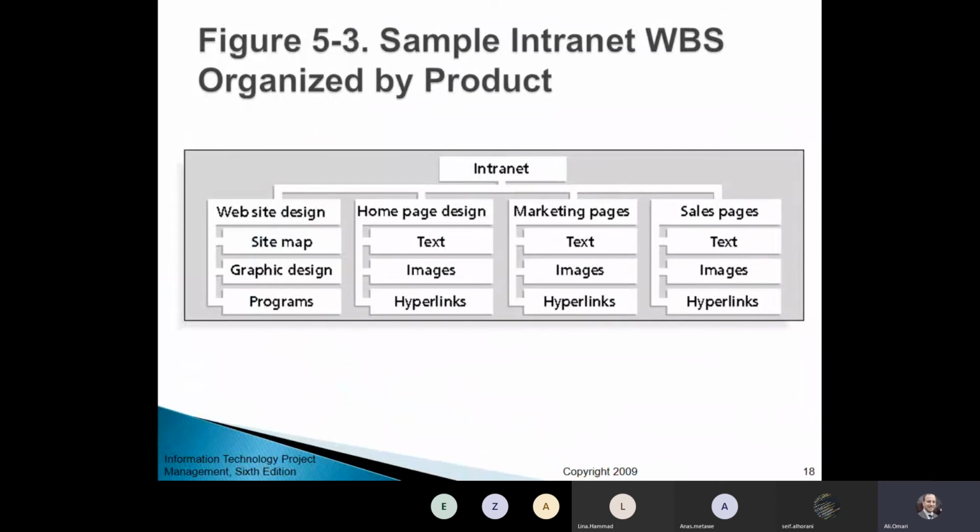When you think about work breakdown structure, if you want to build the house and you are thinking about making the columns for the house, do not think about anything further, like what kind of cement I need to use, what size of the metal I am going to use in the column, and so forth. Think about just building the column, then leave the details to further iteration in your analysis.